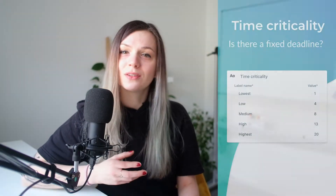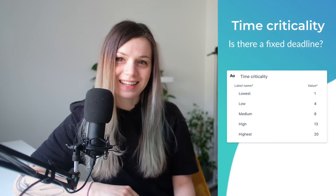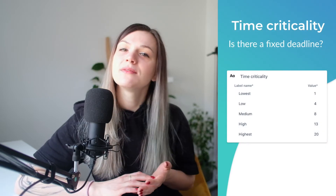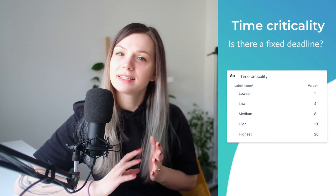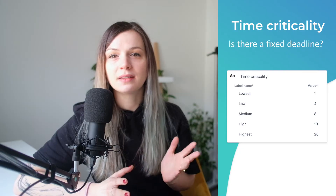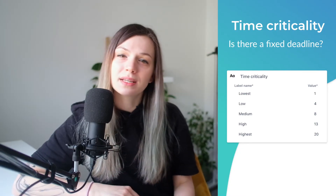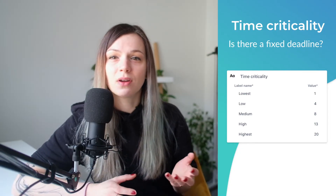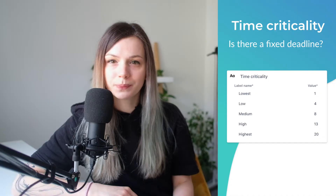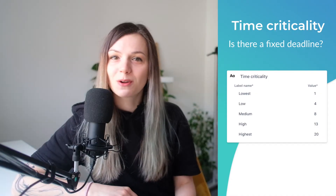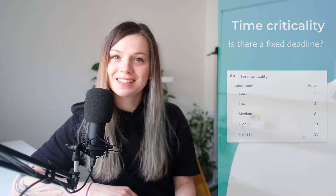The next metric to assign is time criticality. Here we need to assess if there are any fixed deadlines and impact on other teams, or if there is a risk of losing a customer when the task is not delivered on time, and so on. Again, assign values from lowest to highest.